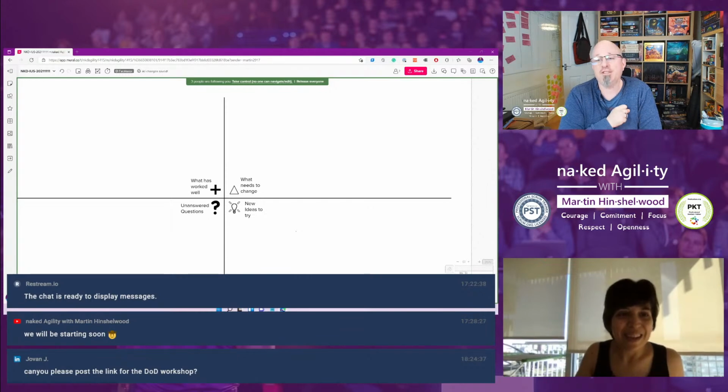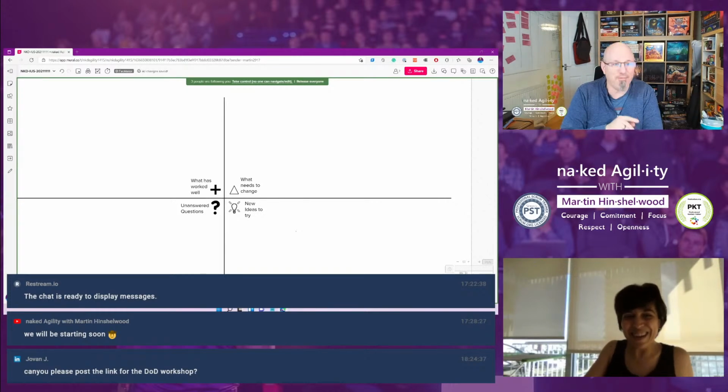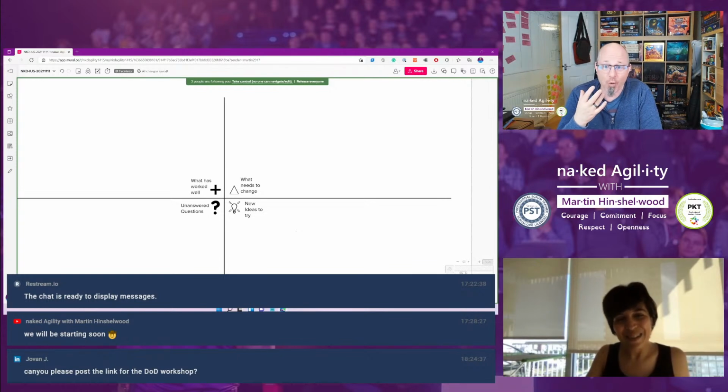Go watch the definition of done workshop, because we specifically talk about why having acceptance criteria on the definition of done is a bad idea. It sounds like it would be a good idea, but it's actually a bad idea because it locks us into scope. Again, we spent all this time in Scrum trying to be flexible on scope, but then we must meet acceptance criteria, and suddenly we're locked into scope again.